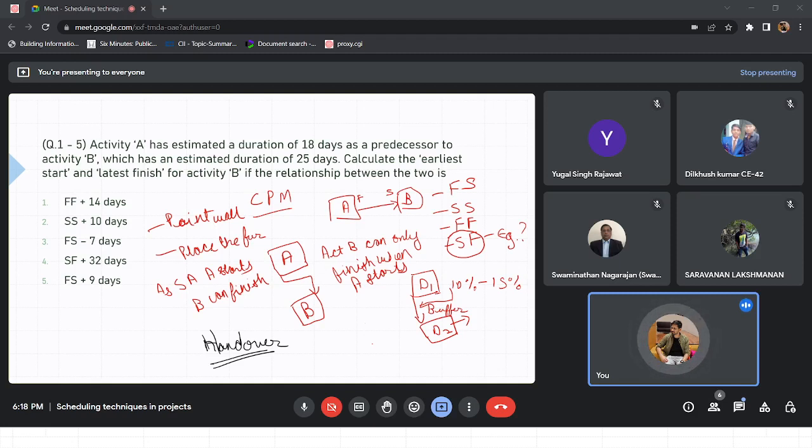Dismantling the generator is one activity, and you also want to connect the house to the power supply, I mean the transmission lines. Connecting to the transmission lines, or getting supply from the transmission line, is another activity. You can only finish dismantling your generator once you start getting supply from the transmission line, right? So this is again a kind of handover in different terms. Yeah, correct, sir. Okay. So with these things clear, we will move on to the question.